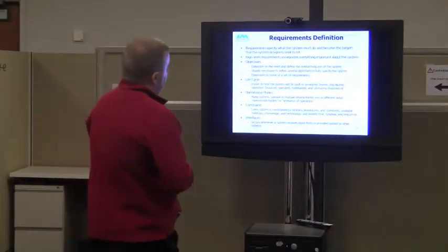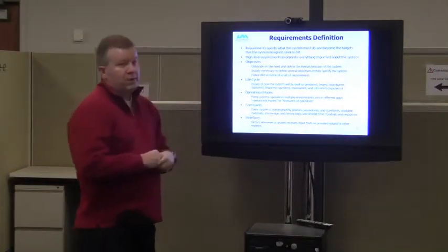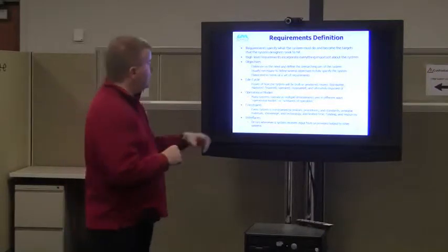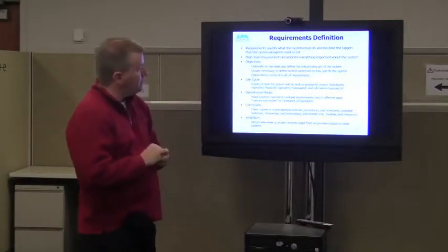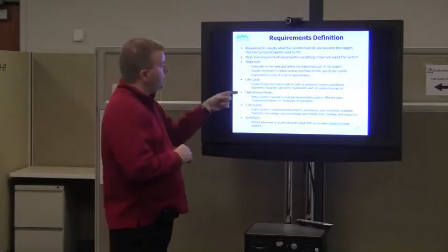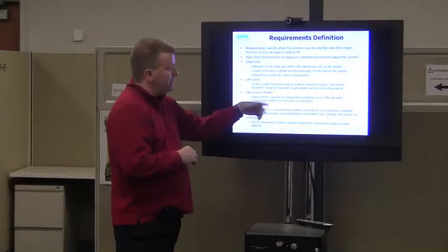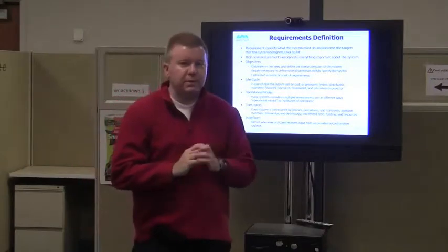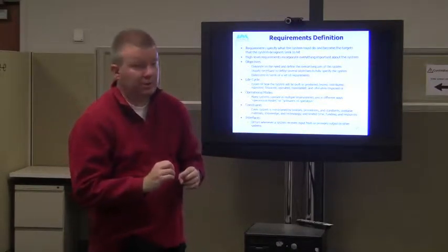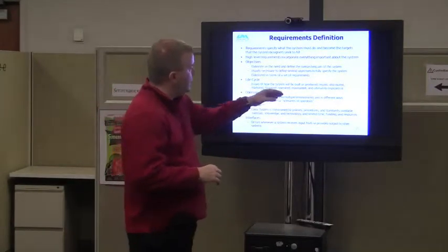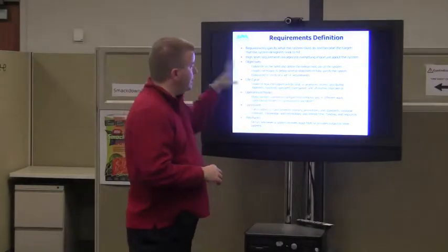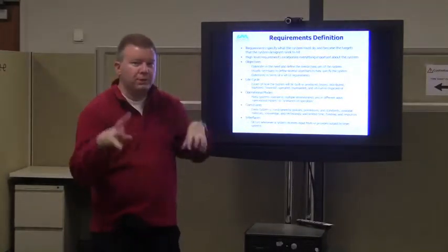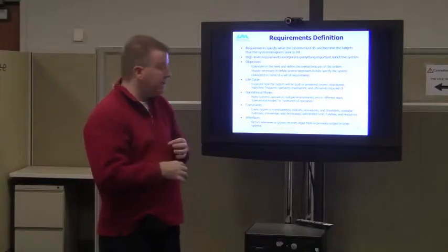Okay? There's also the life cycle that will generate requirements, right? And so issues of how the system will be built or produced, tested, distributed, marketed, financed, operated, maintained, and ultimately disposed of are a part of the requirements, okay? And so you need to remember that. So all of these are going to give you requirements. How is it going to be built? How is it going to be tested? All of that is going to start imposing requirements on your system, so you can look at those.